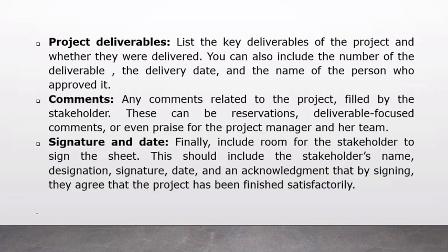Finally, include room for the stakeholder to sign the sheet. This should include the stakeholder's name, designation, signature, date, and acknowledgement that by signing, they agreed that the project has been finished satisfactorily.